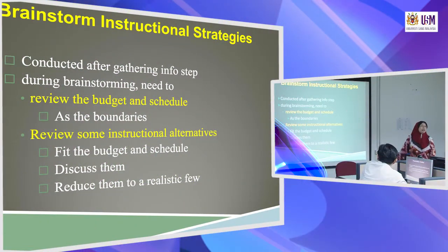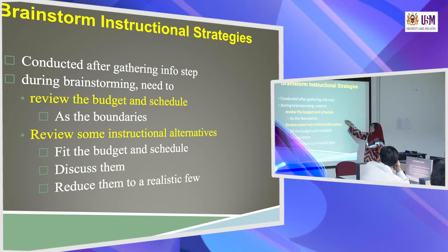The process of brainstorming instructional strategies. I think you have done this. It is conducted after the gathering info step. During brainstorming, you need to review the budget and schedule as the boundaries, and then review some instructional alternatives that fit the budget and schedule, discuss them and reduce them to a realistic few. We have done this for our seminar.